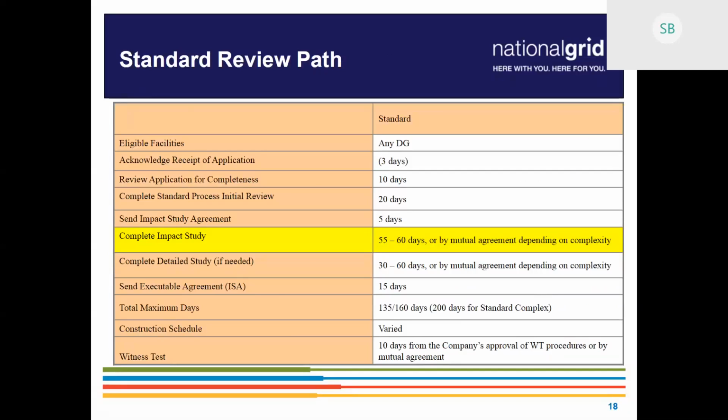Okay. So what we've done is we've pulled it up much sooner in the process. It's going to be done during the impact study. What Sarah mentioned was that there is a potential for any study to go on hold pending a decision by the ISO on whether they're going to need more analysis or further study, depending on what else is happening.